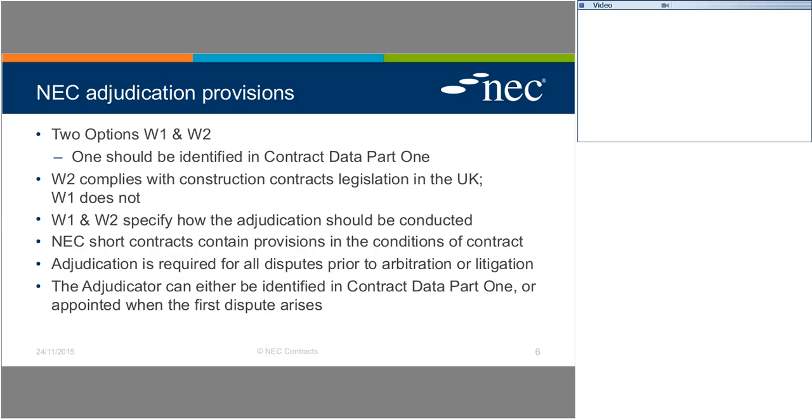Now, within the UK, there is specific legislation governing how construction contract disputes should be resolved. You'll see in a subsequent slide that's the Housing Grants, Construction and Regeneration Act in England and Wales and in Scotland, and the Construction Contracts Order in Northern Ireland. That places obligations on parties to what that Act calls a construction contract to do certain things.